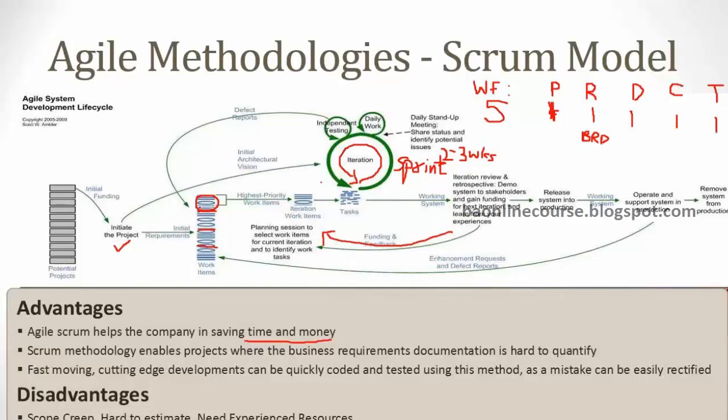Now let's say for simplicity's sake there are 20 features and we have broken down 5 features in each sprint. So in the topmost sprint we picked up 5 features and developed them, and the feedback came that 2 features can be done in a better way. One of them is important and one of them is not so important. So what do you do in the next sprint? You move one feature down, add the important feedback onto this, and then pick up the next set for the second sprint. So effectively, you have faster feedback.